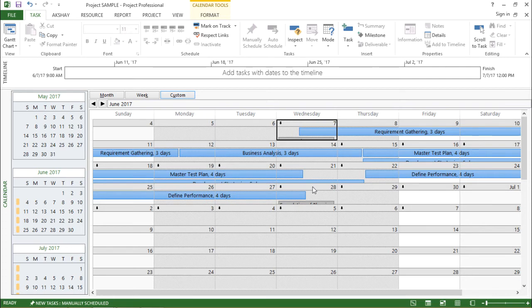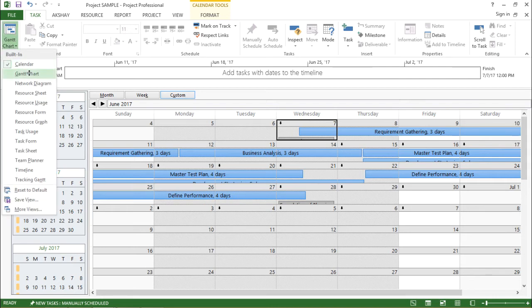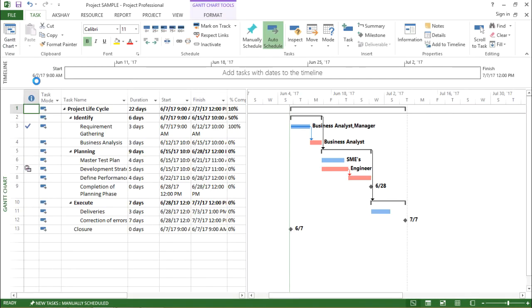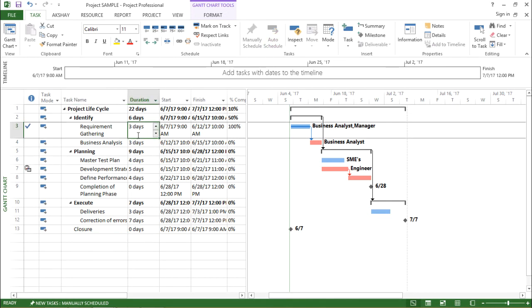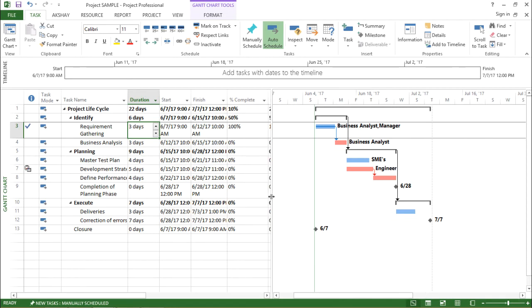So basically, custom helps me create the view according to my own requirements or dates. That was about the calendar view in Microsoft Project 2013. Now, if I click on the drop-down box and select Gantt chart view — this is the view we have been seeing throughout all our videos. It is the standard default view, where I can see the task mode, task name, duration, start, and finish.